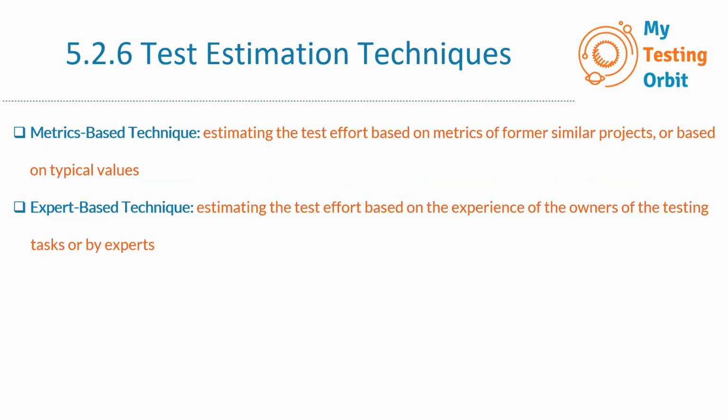The next one is time estimation techniques. The estimates are often dependent upon the type of testing to be performed and also the quality of the resources available on the project. For example, the complex tests which are created by a member of a team who is, let's say, not familiar with the testing tool are likely to take much longer than the tests which are created by an experienced tester who is well familiar with that tool.